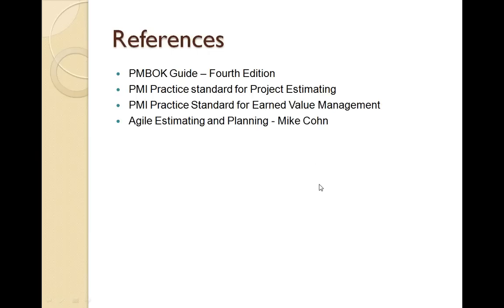Okay, the next question is, can you tell a few examples of risks related to estimation that we can include in the risk management plan? Okay, I'll tell you a few examples. Let's say you are working on a software development project and you are dependent on an external environment. Let's say you are working on a project which is based on a cloud environment, and the procurement part is not yet finalized. You do not have all the procurement related to the project completed yet. In that case, what you will practically do is you will make sure that risks are attached to your estimates. So what you will say is, if I have to give the estimates right away, I will consider the uncertainties or the risks, which is basically the procurement not being finalized in time. If this is a risk, then my project estimates will probably be 10% off, or it might introduce 1 month's additional delay to what I have estimated.